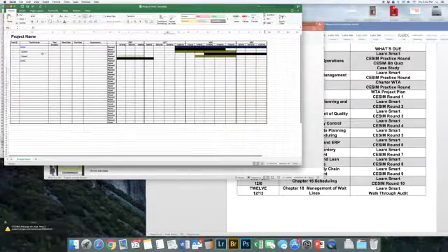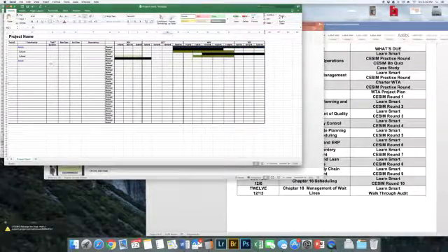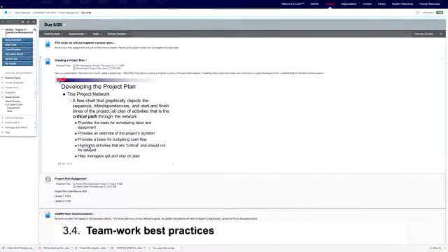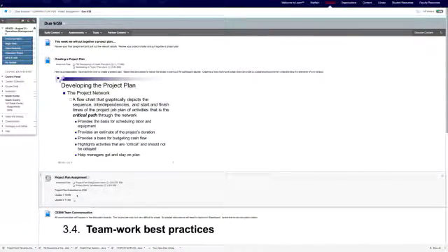So the initial piece is going to be all your tasks and activities, your planned start and end times. And you're going to graph out those start dates and end dates by putting colors in the planned rows. And then when you submit your updates, because you'll be submitting an update on 10/26 and an update on November 30th, you will continue to update that project plan with your completed bars.